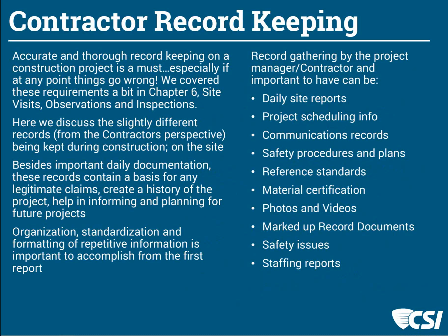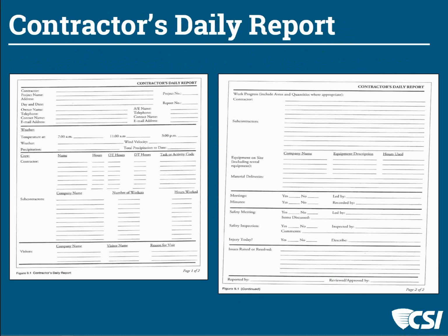next couple of slides. But Matthew, let's take a look at the next slide, because these are examples of what we should be seeing in relation to the records. You know, who's there? What's the weather? What are they doing? In specifics. These are out of the practice guide. I know you can't read them, but suffice it to say there's hourly documentation of what's happening.